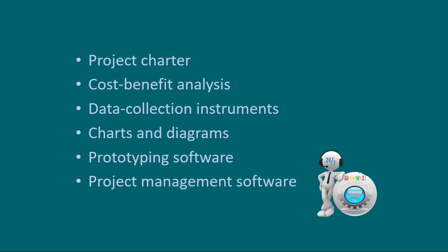Some of the categories that you will see in this are acquisition costs and operating costs. Operating costs are those things that are ongoing, continuing costs to operate that technology. Acquisition costs, just how it sounds, it's the initial cost to build or buy that technology. When it comes to the benefits, there are categories of benefits. Those are tangible benefits that are relatively easy to quantify, such as expenses that have been reduced, or in turn, it might increase the revenue opportunities that you have as an organization. On the other side of tangible benefits are obviously the intangible benefits. And these are those expected results from a project that are difficult to quantify or to measure.